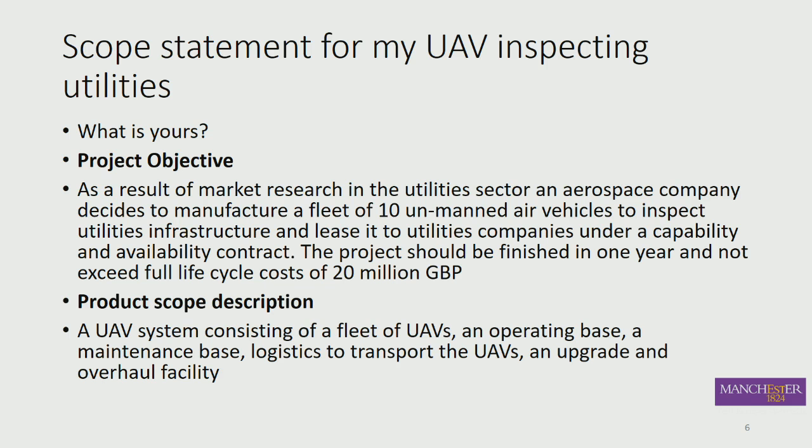In fact, with rail, it would probably cost something of the order of millions of pounds to paint a gas distribution pipeline because it's near King's Cross. So the actual real cost there is the availability of track. You have to pay Network Rail to stop trains from moving. And as soon as trains stop moving, then they stop making profit, and you have to pay them in compensation. So those are the kind of reasons.